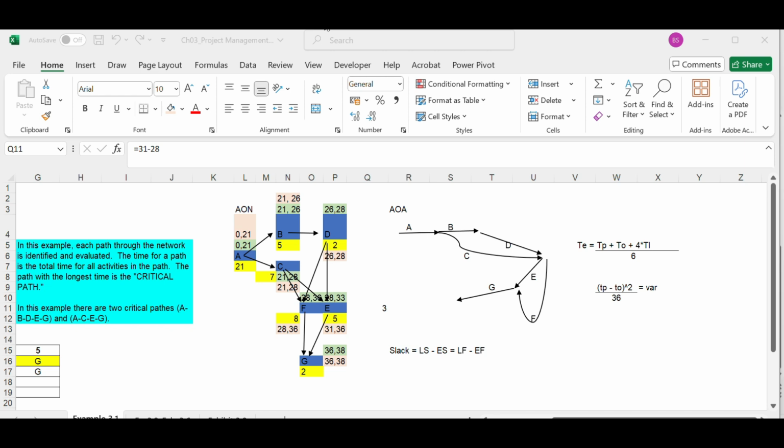It can be resolved by using a PERT, a probabilistic program evaluation and review technique. PERT is a solution for this common cause variation. Some examples may be Monte Carlo simulation. We can assign a project buffer. Another kind of problem that can occur after the duration estimation is merging multiple predecessors.